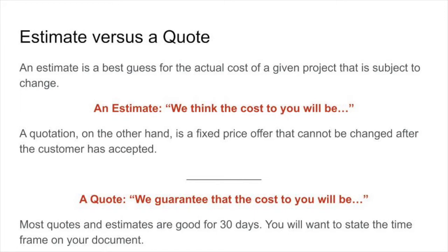So you give me an estimate based on a guess, based on not a lot of consideration, based on, I caught you in the store and I asked you to paint my house and I asked you, how much do you think that's going to cost? That's really what we consider an estimate. I can't hold you to that price. Obviously, I want you to be in the ballpark of that price, but I can't hold you to that price. So an estimate is, from a legal perspective, a non-binding price that you give someone that can be plus or minus some amount, a reasonable amount, over and above. As you get more experience at doing work, your estimates will become much closer to reality.